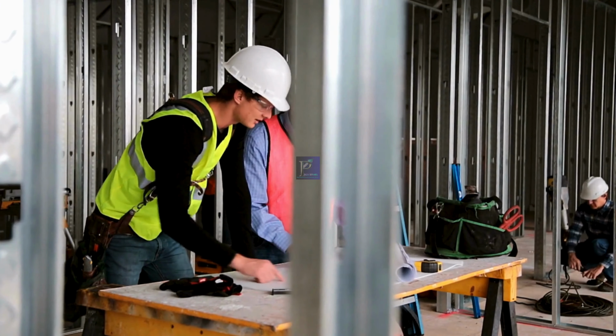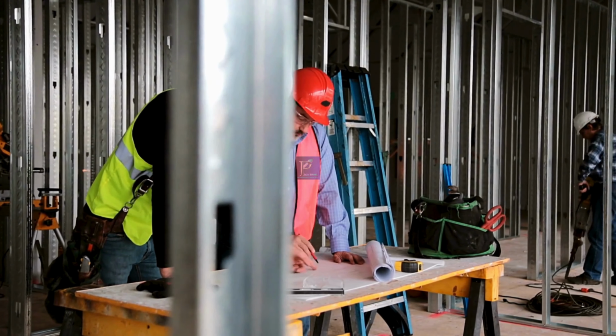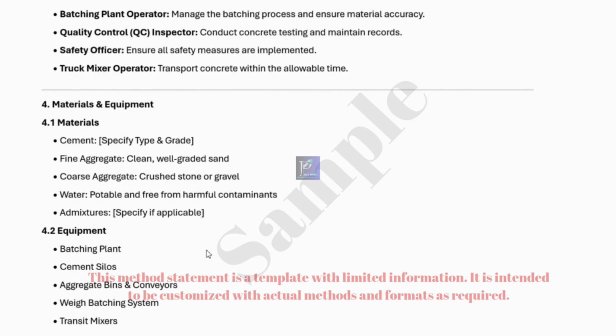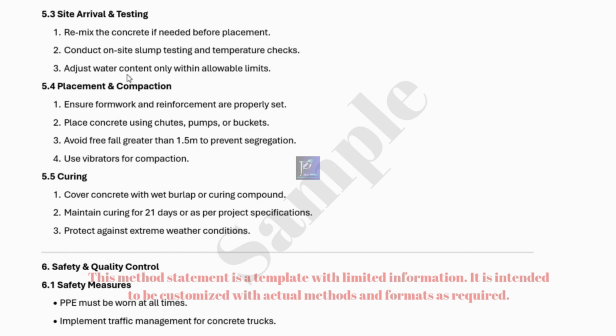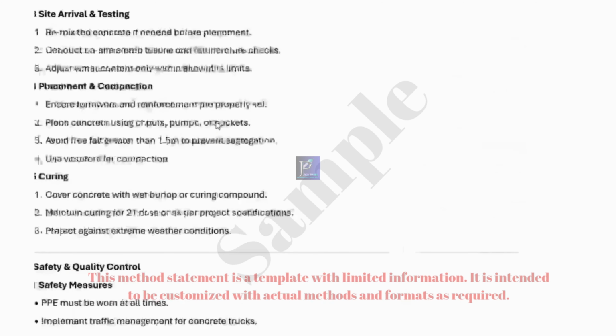By now, we understand that a method statement consolidates all relevant information necessary to execute a task correctly. Once the method statement is approved, a formal training session should be conducted for employees. However, before starting a specific activity, it's important to conduct a quick pre-task briefing, which we are talking about, pep talk. It can be daily, it can be weekly, as per the work schedule.